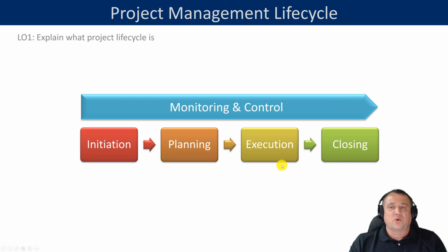Now, I already mentioned that the project management lifecycle is a very important framework. This framework influences a lot of other artifacts. For example, your project management plan is largely influenced by those typical phases in the project lifecycle. Your work breakdown structure should contain items related to all 5 phases of the project management lifecycle.